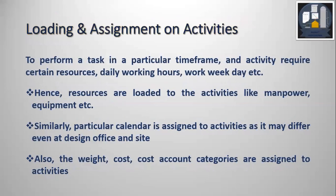Loading and assignment: to perform a task in a particular timeframe, an activity requires certain resources — daily working hours, work weeks, etc. Resources are loaded to activities like manpower, equipment, etc. For example, for a welding activity we need welders and trade assistants. For a lifting activity, we need cranes and riggers. So these resources are loaded.